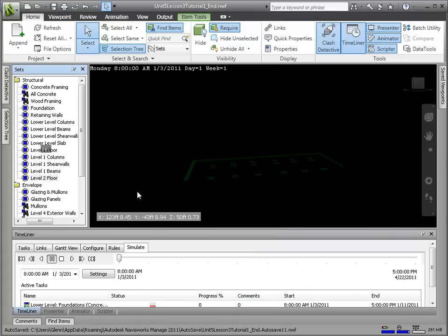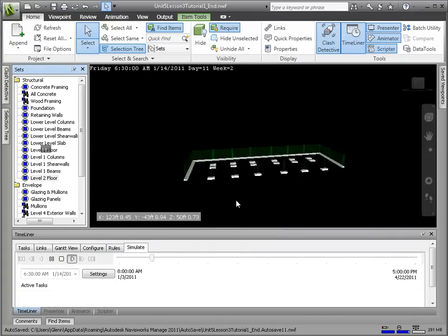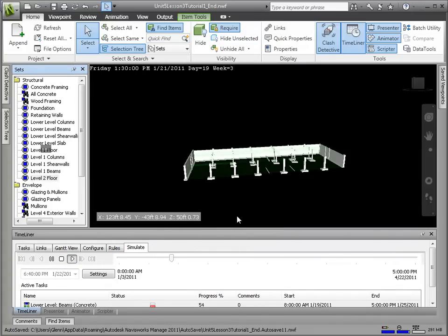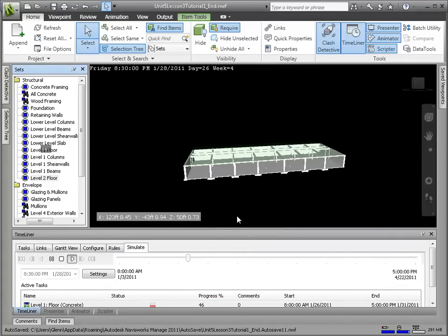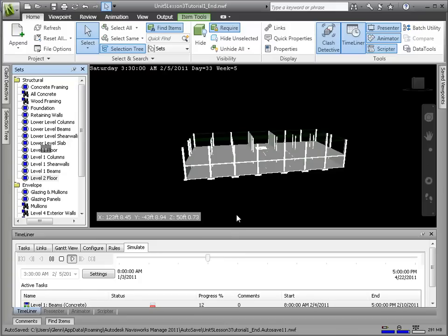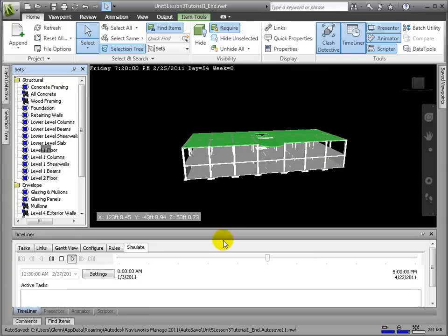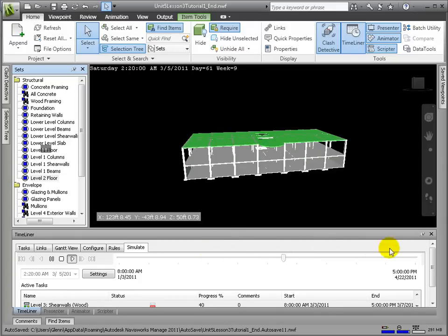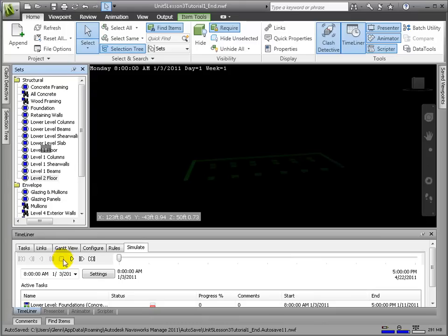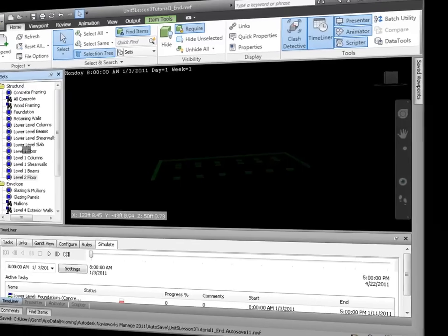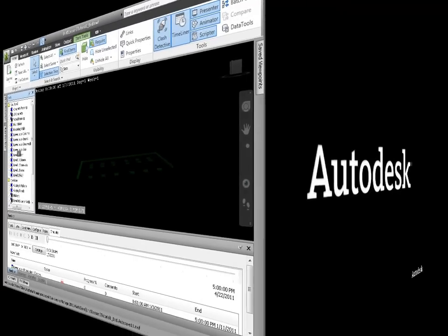Click Play to playback the entire simulation. We see how the items appear in scene transparent at the start date and end up in their default model appearance upon completion. This was according to the settings in the Configure tab. There's also a timeline from the start to end of the project, which allows us to see still shots mid-construction at any point in the project.